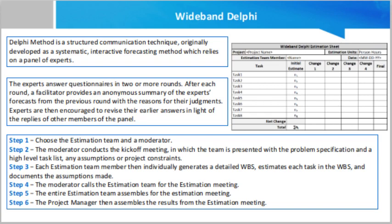Step 5 — the entire estimation team assembles for the estimation meeting. Step 5.1 — at the beginning of the estimation meeting, the moderator collects the initial estimates from each team member. Step 5.2 — the moderator then plots a chart on the whiteboard, plotting each member's total project estimate as an X on the round one line without disclosing the corresponding name. The estimation team gets an idea of the range of estimates, which initially may be large.